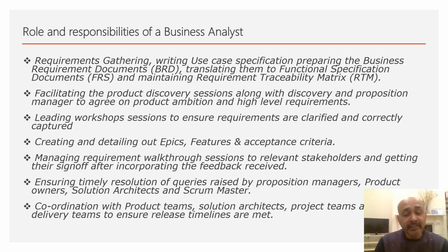Once you understand that your requirement gathering is complete and your requirement is refined, then you go back and provide a walkthrough to these people, and you understand from them if there is any feedback. You incorporate that feedback, you change your requirement details as per the feedback received, and you take a sign off from them so that you can pass on these requirements to the design teams.